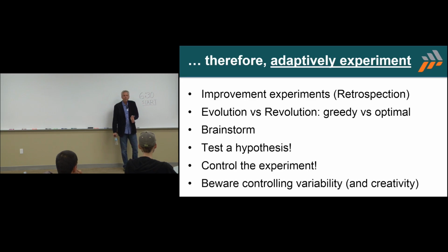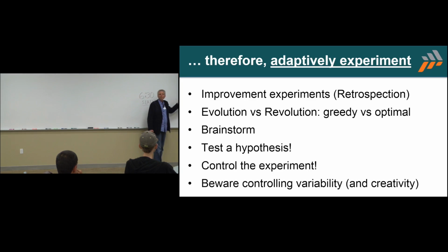I think someone should say, hey, you know, we're beefing up our ready criteria. That means our velocity should go up by at least 20%. And then we should go prove it. Because it makes us honest. You know, we're really running an experiment. We're going to really try.